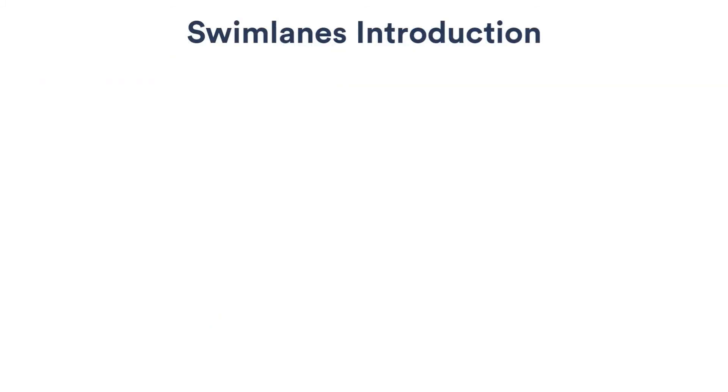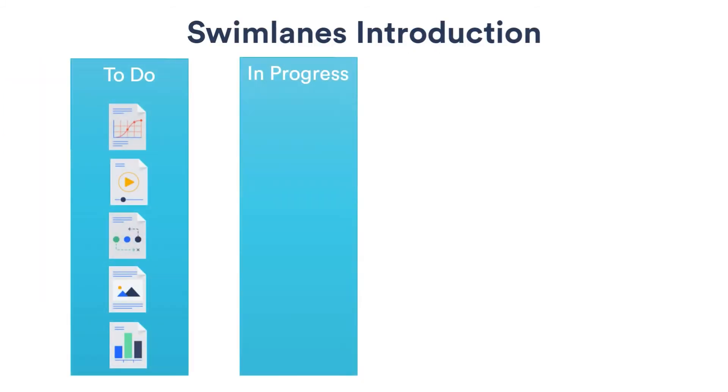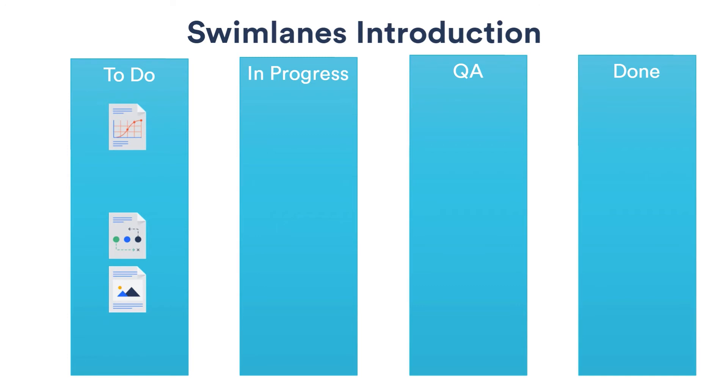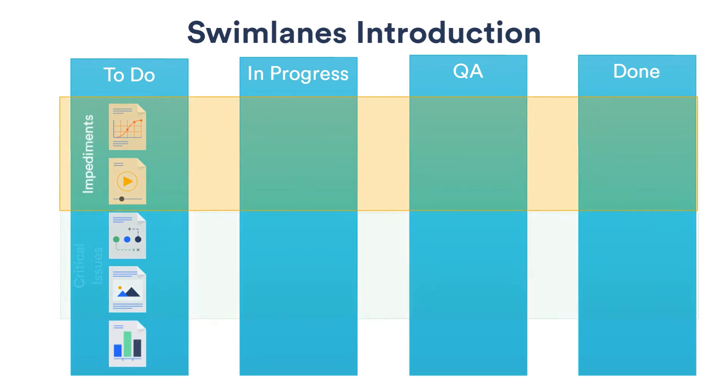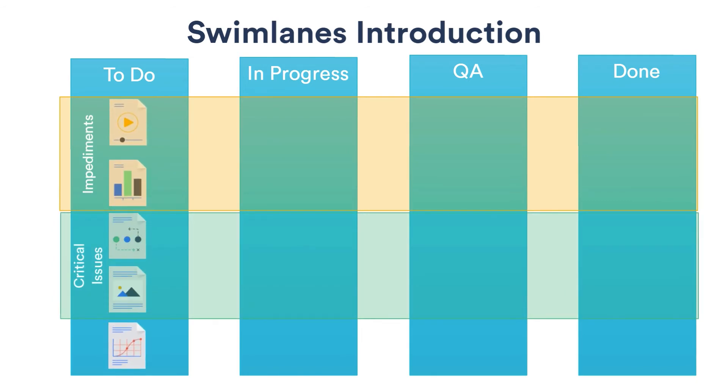We've talked about quick filters. Now, let's look at swim lanes. Quick filters and swim lanes are similar. Both allow you to see issues on your board in a more easily interpreted display. Whereas quick filters temporarily change the subset of issues displayed on your board, swim lanes invoke a more permanent change. Swim lanes group similar issues together horizontally, by type or category.